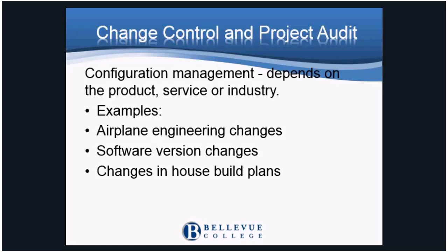A blue streak change is a change that needs to be done right away to be included in the final result. Nothing needs to be torn apart or taken out, but a change needs to be made in order to align to the schedule, and it's done at the same time. A red streak change is done when something is actually torn out and replaced.